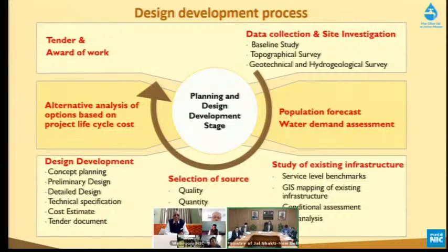Here I would like to focus on design development. What I see is that most of the time, due to time constraints, we go directly for the detailed design. So my suggestion is that let's go step by step. In the very initial stage, let's do the conceptual planning. What kind of scheme should there be? Should it be an SBR scheme or an NBR scheme, what kind of source should we select, what kind of treatment should we select, because all these planning aspects are going to affect the cost, and we can make cost-effective solutions.